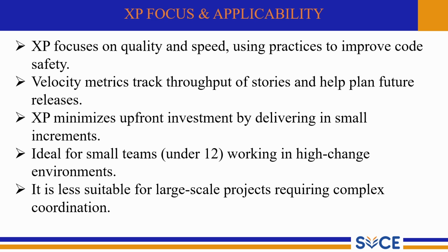Instead of spending months on analysis or documentation, XP delivers working software in tiny increments. This reduces waste and ensures customers start seeing value very early in the project. So, ideal for small teams under 12 members working in a high change environment. XP is best suited for small, tightly knit teams when requirements change frequently and direct communication is possible.